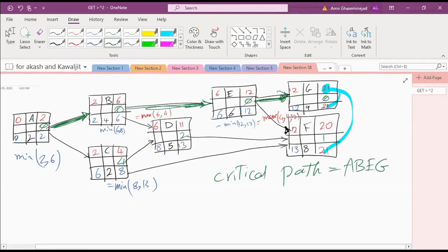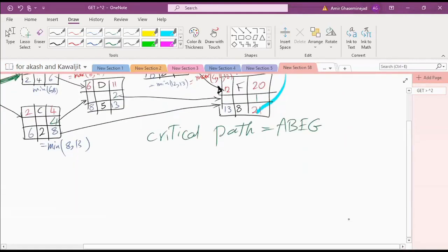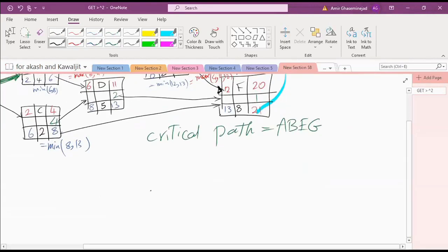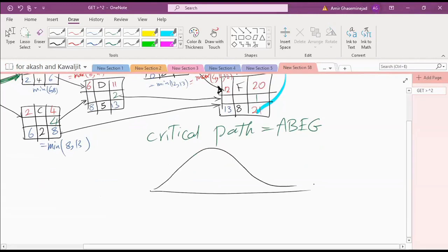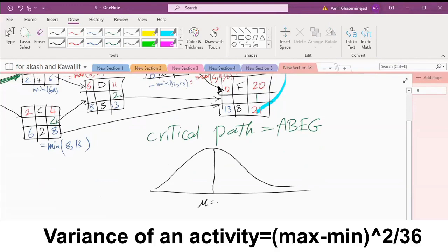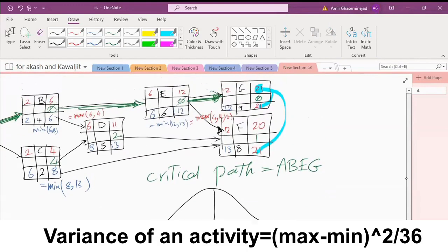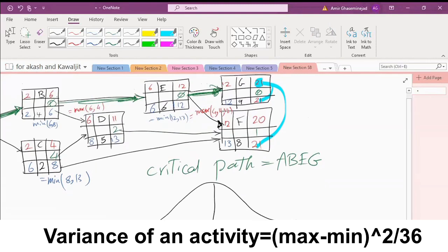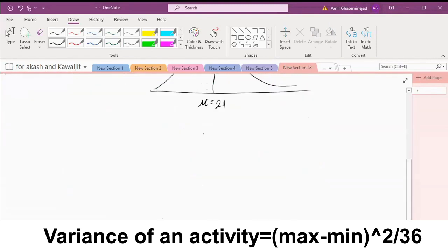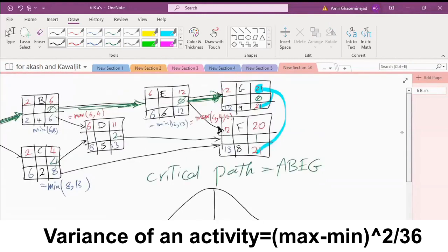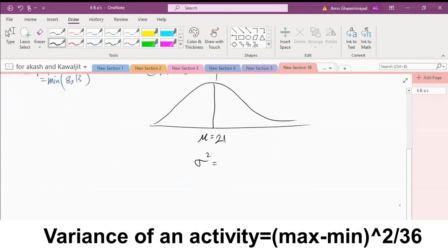Now, when we think about the whole project, the completion time of the project — although each activity has a beta distribution — based on the central limit theorem, the whole project completion time will have a normal distribution. The expected completion time for the whole project is 21 weeks. The variance for the completion time would be the variance of the activities on the critical path.